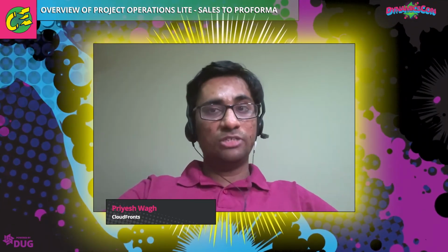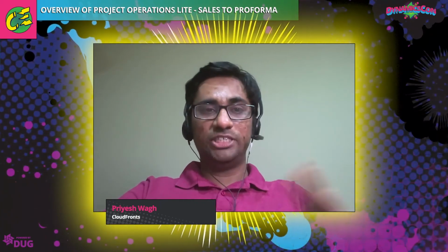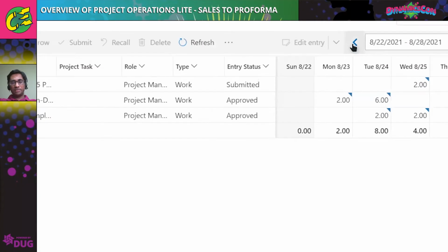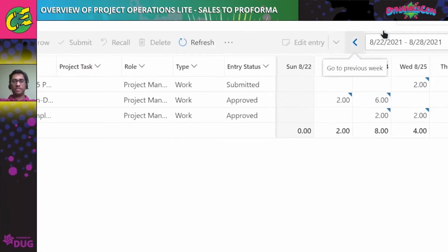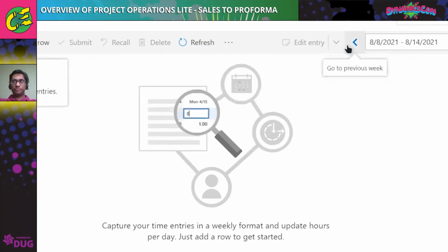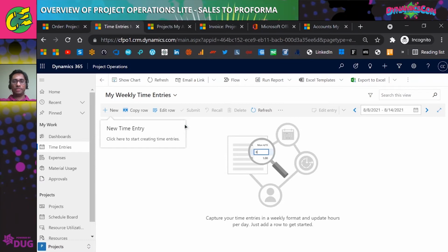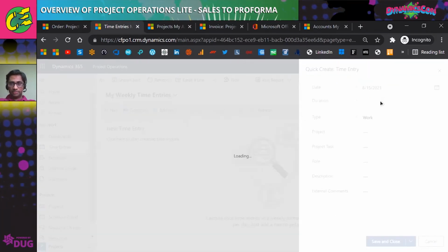Now let's quickly go to the time entries. So since we have other type of order line or quote line, which is time and material, which is tied to the project. So let me go 1 week in the past. The reason I do this is because I want to be safe and go back in past, so that whenever you generate these invoices, maybe it will pick time entries which are based on the date which happened before. So like you can't have a time entry dated forward to pick in the invoicing. So I'll just create a time entry here.